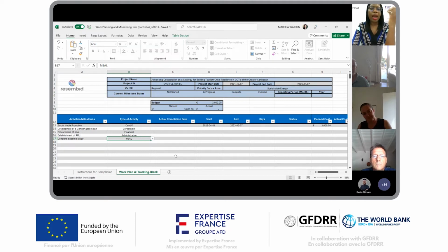The other thing I want to also indicate to you, colleagues, is that we do not want the granular activities. So for example, purchase stationery, we don't need that. Or purchase laptops for the project management unit. You don't need to go into that kind of granular detail.